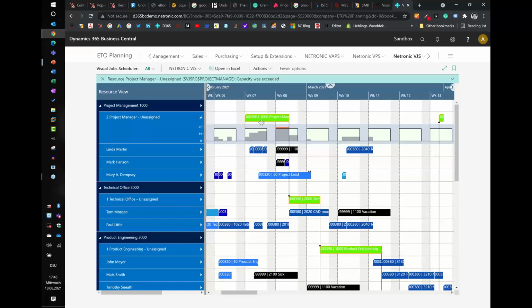because our guys are pretty busy, and then they can say maybe we could start earlier, but if the customer is not ready, then we say, okay, we need to actually postpone this by 2 weeks, because here in the second week we cannot handle the project scope, because we actually did bad management, because Linda and Mark are on vacation. These are these black bars, and Mary is already scheduled.